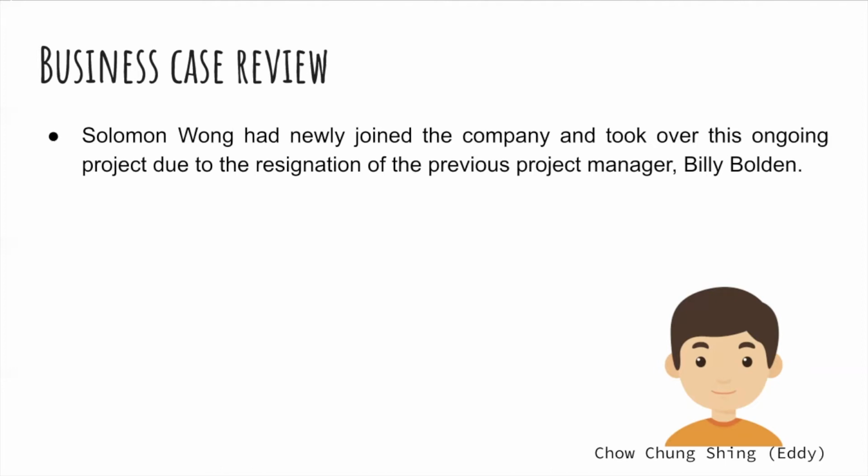Billy did not hold progress meetings with the clients and project team members, so the sponsor did not know the actual progress and difficulties of the project. To meet the deadline, Billy adopted McGregor's Theory X to manage his team members. He kept urging and scolding team members to meet the deadline, causing low morale on the project team. The clients kept changing requirements and the company lacked a management plan for controlling changes to the project scope. Therefore, scope creep happened and project members did extra work that was not in the scope.